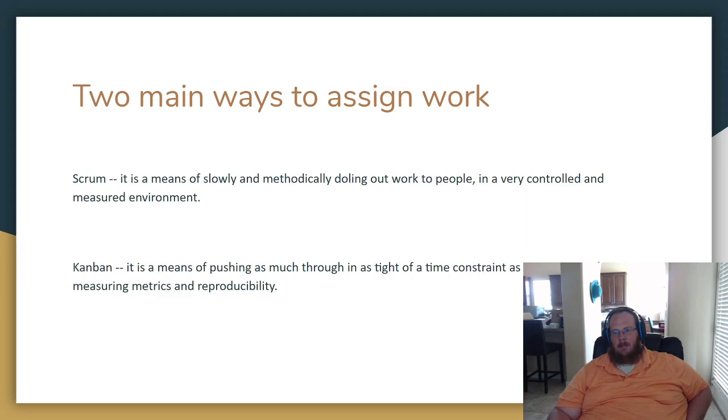Where you have a bunch of work that needs to be done, and you get everyone together and you figure out what aspects and pieces of work need to be done. And you write them all down on little pieces of paper like Post-its, and you put them up on the wall. And then you rearrange them to be in a logical order. And then basically everyone has said things need to happen in this order. Step 1, step 2, step 3, step 4, all the way up.